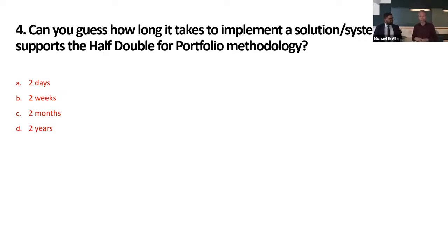2 weeks later, when we met again, those 2 projects were still stuck. No one worked on them because there were no people assigned to them. So you get to the same point, whether you prioritize or not: projects are not being done if you just put them into the system and no one is actually working on them. So I think it is also interesting that some of the organizations who run portfolio management today, by not making those active decisions, just leave it to the rest of the organization to make those decisions. And of course, the system here helps us to be on top of those decisions as a portfolio board.